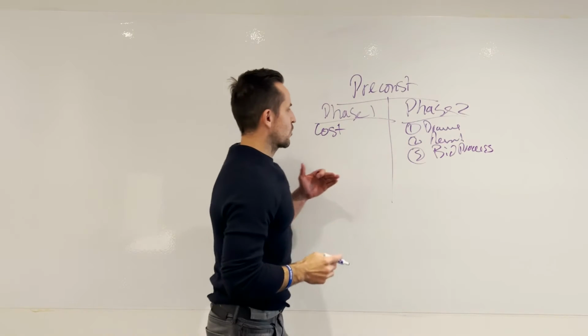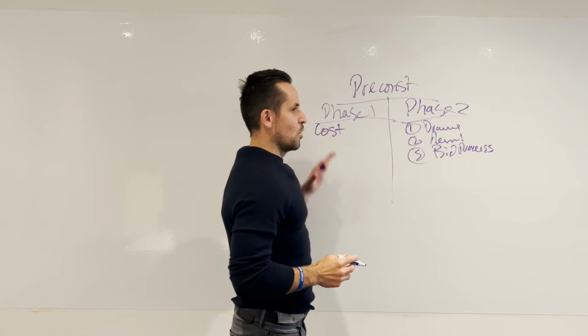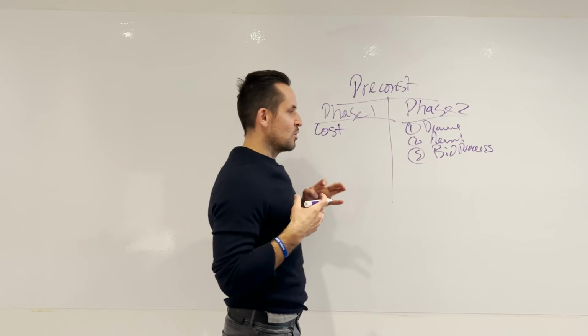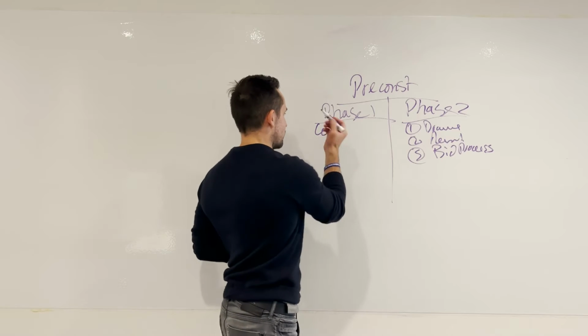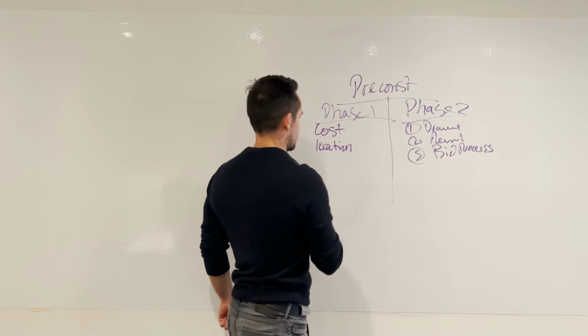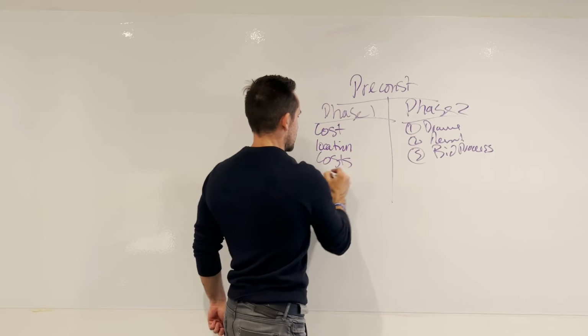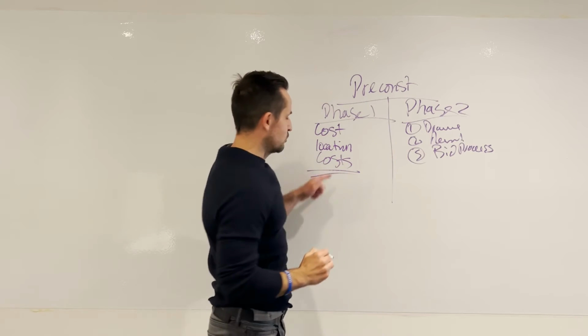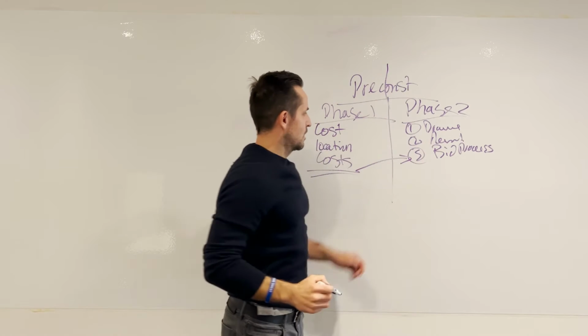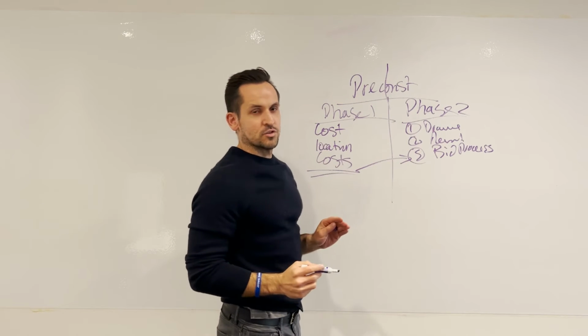So what's so critical in phase 1 is you have a real estate agent that's involved, you have the lender that's involved, and it's so critical to understand that first you find a viable location. Is it a fit? Is it an awesome location? And second is also knowing the cost. The cost usually is unknown until you get to the second phase of the pre-construction.